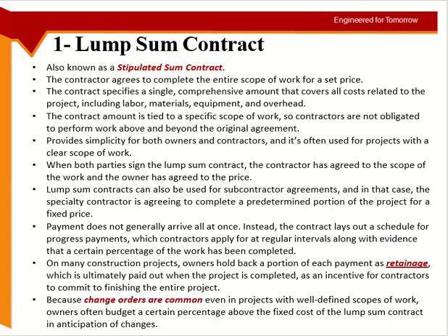When you say labor, you mean the thing which is done manually. When they give the equipment charge, they are including the person who is coming with the equipment. The labor is, okay, I need 10 people on the site, and that operator is usually not included in those.